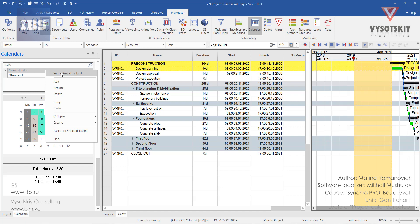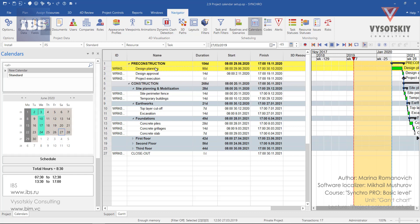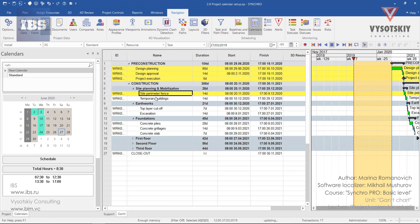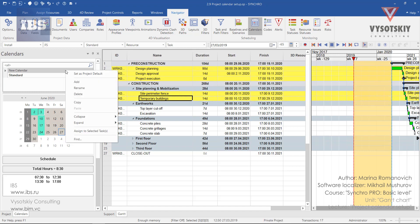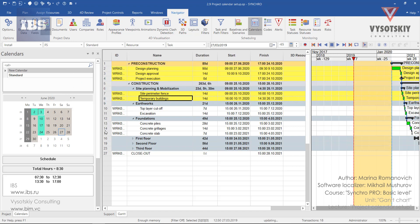Alternatively, if you'd like to apply this calendar only on particular tasks, you may select these tasks from the Gantt chart, make a right-click over the calendar, and choose assign to selected tasks. The calendar has been applied.